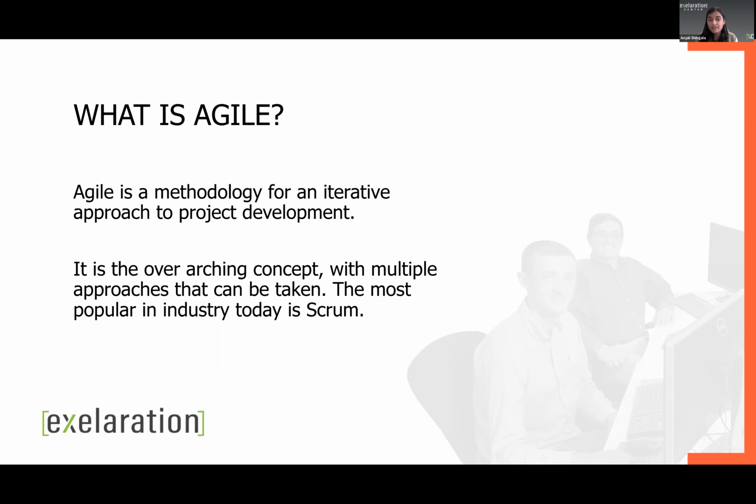By going through an iterative approach, you can keep going back and getting the feedback you need through that loop so that your project can end up how you want it to. And additionally, you don't have to wait the full year for it to come out. You can work on developing a small incremental piece, what we like to call the MVP, the minimal viable product, and use that product to go to market earlier than the 1 year mark.